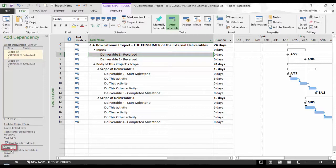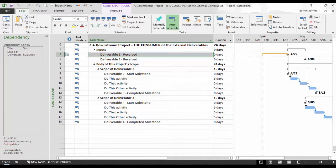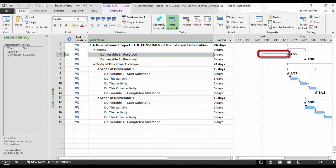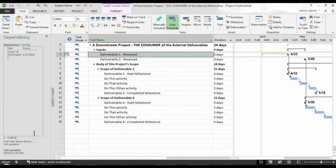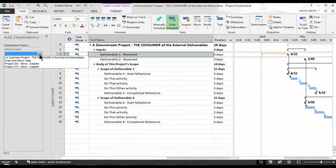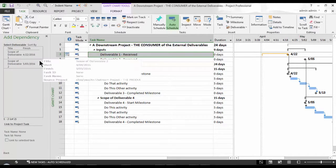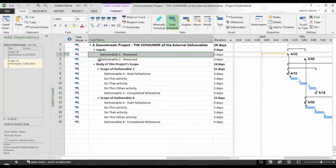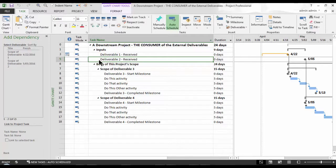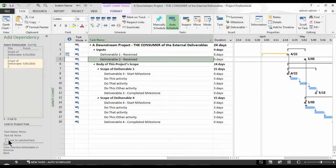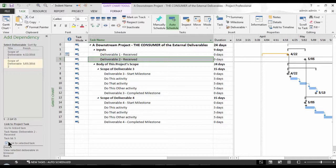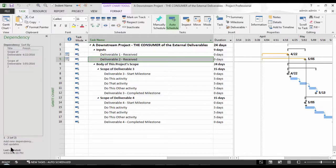I'll select Deliverable 1 from the list, which matches the task name I had given it, and I will click the Deliverable 1 received milestone here in the Open Downstream Consumer file. Now, I will click Link to select Task, and then click Done. As soon as I do this, you should notice a somewhat orange color horizontal line that is drawn to the left of our Deliverable 1 received milestone, in the Gantt bar area that begins on April 4th and ends on April 22nd. There is also a Dependency icon in the Indicators column. Let's do this again, but for Deliverable 2 now. Click Add New Dependency in the Dependency pane since it's still open. Select the Upstream Project from the drop-down. Select Deliverable from the list. Select the Deliverable 2 received milestone.